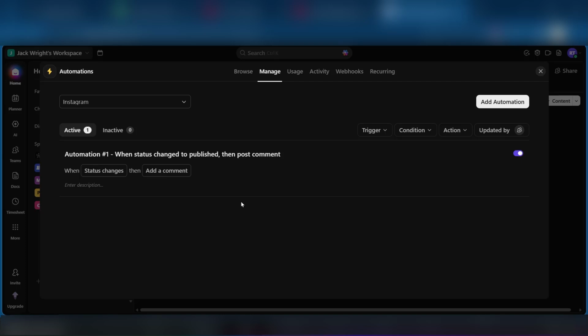You could also create a date arrival trigger, such as when a due date is 24 hours away and the status is not done yet, then you can of course change the priority to say urgent and notify the one who's been assigned, which is the assignee. And then of course you have examples such as automations for recurring tasks, etc. Again, this is up to you.